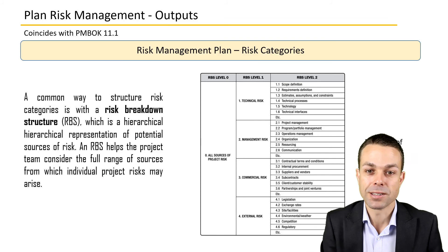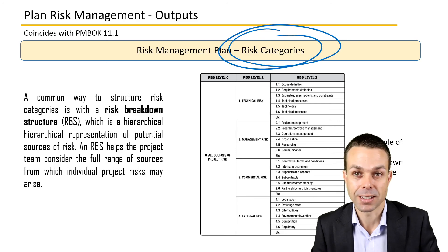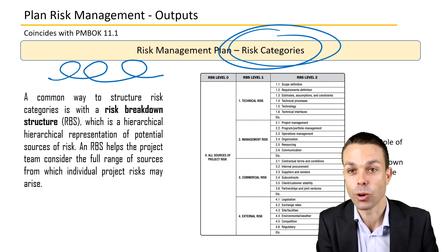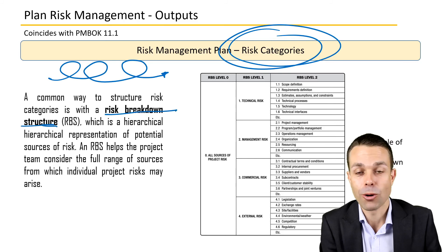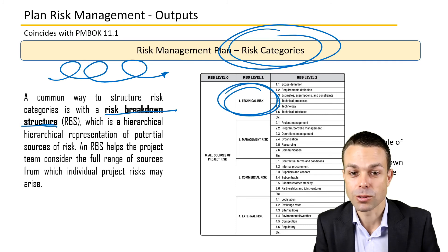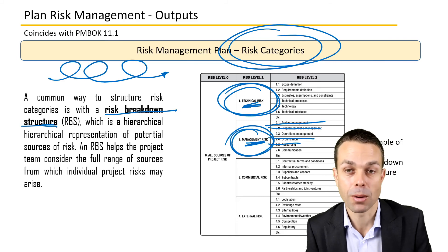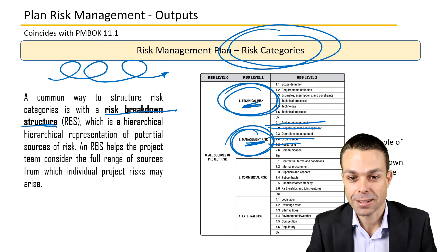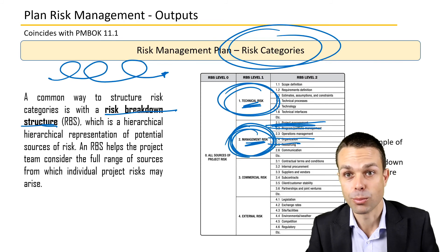One great output of this process is the risk categories. We come up with a bunch of risk categories and put them into the risk management plan as a first idea of the risks we understand for our project. This can be iterative — we might add to those as the project goes along. This involves a risk breakdown structure, similar to our work breakdown structure. We start with high-level risks — maybe a technical risk or a management risk — and then list all risks in that particular category. The organization you're working in might already have categories from previous projects, and you can use those and add your own.